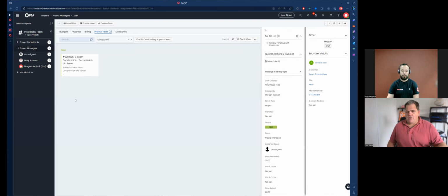That would be something along the lines of, we've got a fixed price that we're charging $5,000 for. And what we're then doing is we're saying, we're going to bill at different milestones. We're going to say, when this phase is complete, then we're going to bill $2,000. Then we're going to bill another $1,000 later on. So the terminology is different if you're coming in from a different tool. Just bear in mind, if you are using another PSA tool, that when we're referring to milestones in Halo, we're actually referring to the phases within the project.